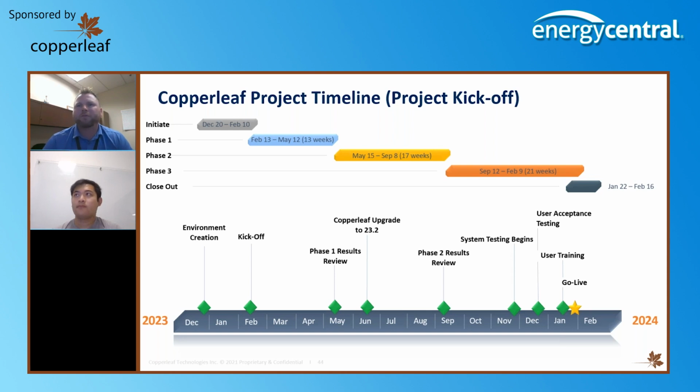We broke it into 3 phases to try and make it manageable chunks, and we did those based on asset families. We have 13 asset families here at BG&E that categorize all of our substation assets, and we started with 3, understood what that looked like, and started to analyze whether it makes sense from a replacement program perspective. We targeted relays, transformers, and breakers.